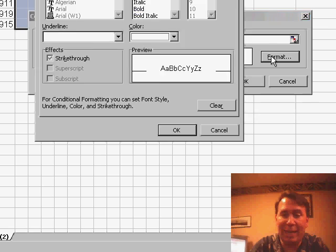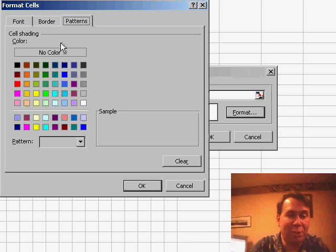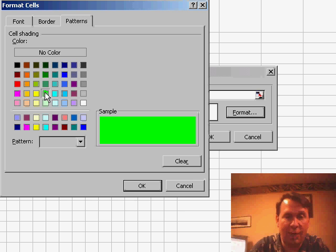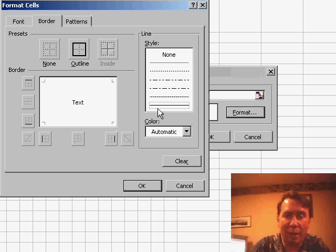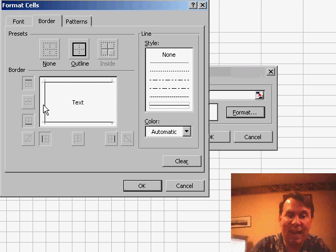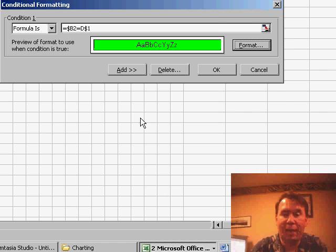Once I've entered that formula, I'm going to click the Format tab. On the Patterns, I'm going to choose the color that I like to use—let's use a green color. And then on the Border tab, specify that I want a solid border on the top, bottom, and left sides of that cell. Click OK.